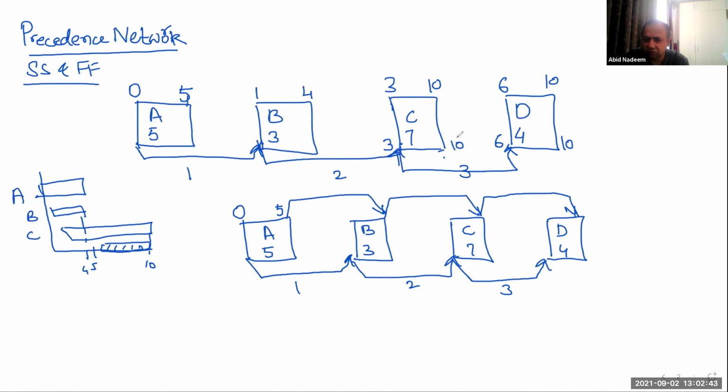So it will be like that. And then from here, I have 3 minus 2, it will be 1, and 1 plus 3, it will be 4. And then from here it was 1, so 1 minus 1, it will be 0, 0 plus 5, it will be 5.